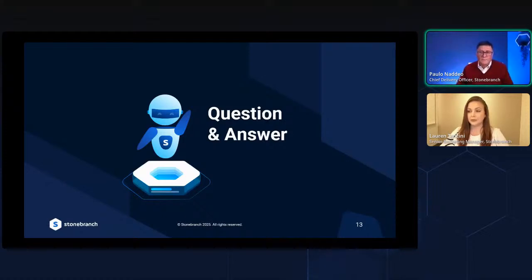And it's a very good way for the customer to start getting familiar with the tool. So they implement the new functionality in the tool, but they still have our engineers assigned to the project that can help with on-the-job training, so to speak, right? But if those changes are massive in volume, then it becomes very difficult to require them to be implemented manually. So on some legacy platforms, we can reprocess the extract and save some time by implementing this in UAC before the cutover. On some other platforms, it's going to be brute force, right?